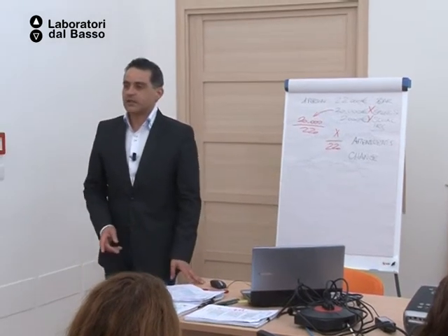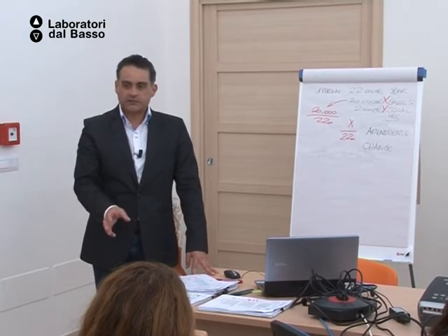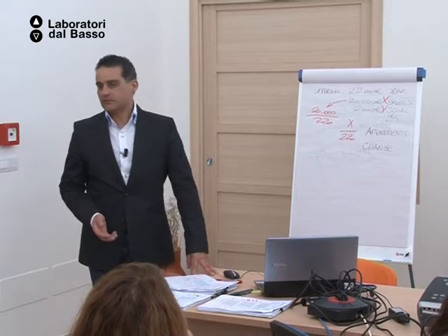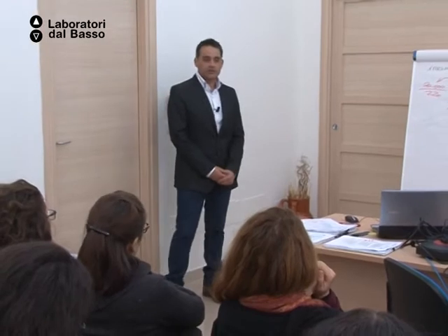The 30% rule is the maximum budget that you can consider for the subcontracting. For some reason, imagine that I need to translate all the documentation of my project in Bulgarian, a subcontract translation. It's a very bad example, but you will subcontract something that you can't do within your partnership. So when you build your partnership, you will obviously look at partners that can bring everything you need. This is not a trap, but you have to think logical, you have to be real. You will create a partnership basically to bring everything you need. But there are sometimes things that you need to subcontract for some reasons, depending on the project.